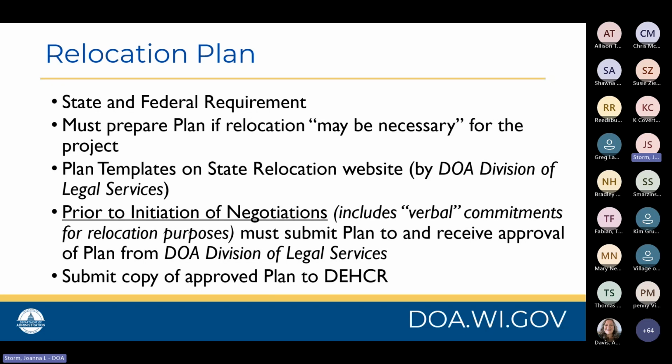And note that prior to the initiation of any negotiations, which includes any verbal commitments for relocation purposes, you must submit a relocation plan to and receive approval of that plan from our DOA Division of Legal Services. You'll also need to, if you haven't done so already, submit a copy of that approved plan to our staff.